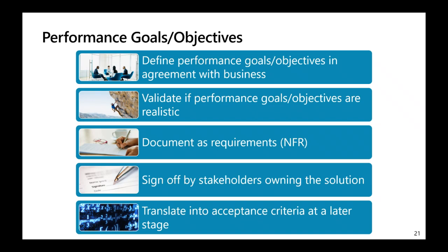The performance objectives should also be documented as non-functional requirements. And a sign-off of the performance non-functional requirements is an important aspect as well, and should be done by the stakeholders owning the overall solution. It is also important to have the right support to carry them through the project.